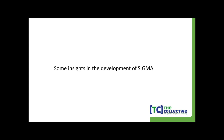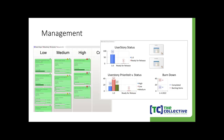How did we manage the development? We used Scrum to manage the development of the system. We built up a backlog, ran two-week sprints, did sprint reviews with customers, and then updated the status. That way we are always in control, and we created a product that you can use.